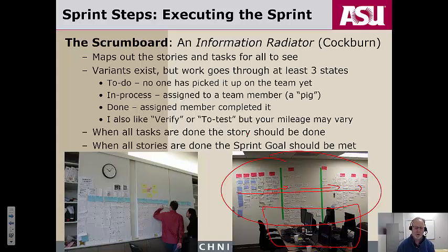And tasks, by the way, should be scoped to only be kind of defined in hours long kind of format. In other words, as a developer, you should be able to move a few different tasks through these states per day. Certainly several per week. So it's very dynamic. If you take a snapshot every day of what the board looks like, it should increasingly look heavier on the right if you're maintaining your velocity.